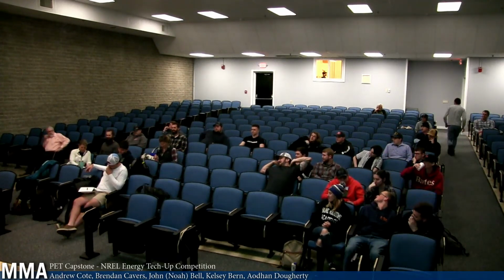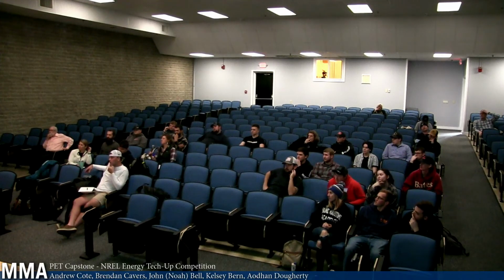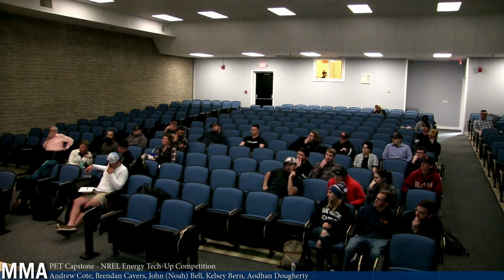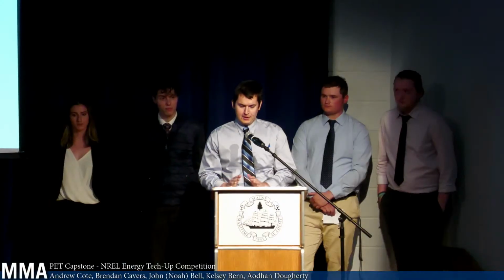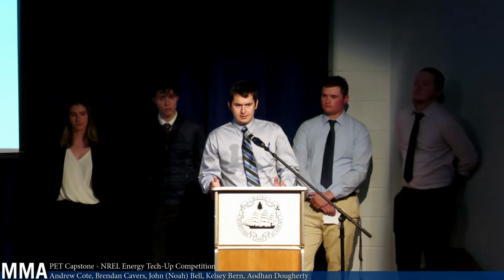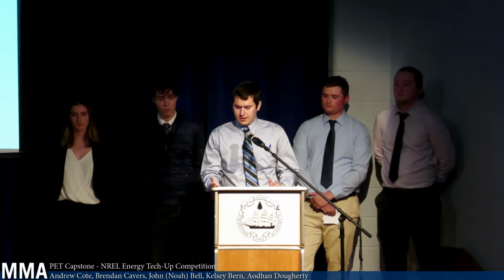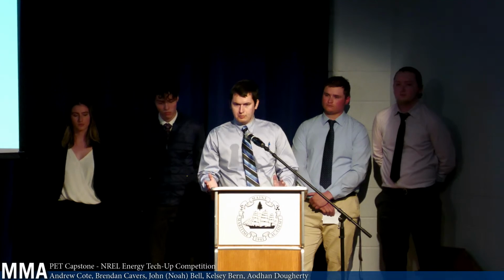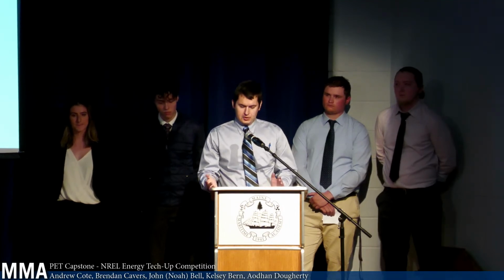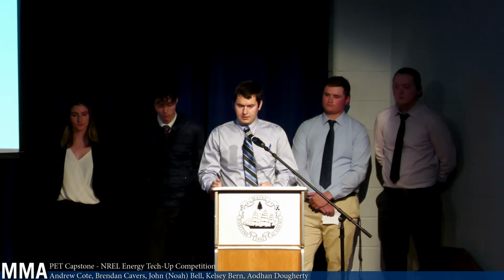My question was, what sources did you use to figure out the installation and operational costs? So from the Excel document, they had a techno-economical analysis for their plants in Monticello and Prairie Island that they're going to be installing there. It's like a 600 megawatt plant and like a 400 megawatt plant. And they've done a lot of research into the capital installation costs and operational costs. So what I did was I took those figures and scaled it down about 15%. I made sure both were relatively the same scale, just to ensure the numbers would match. So basically it was just scaled based off of those numbers, so it was able to convert over relatively well.